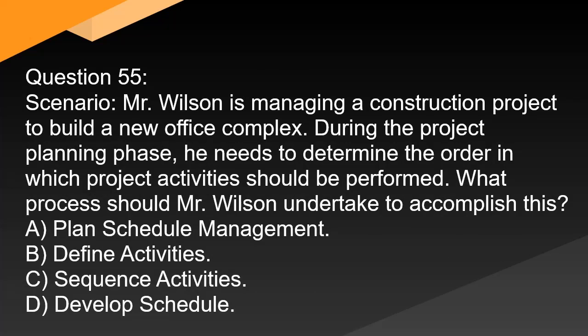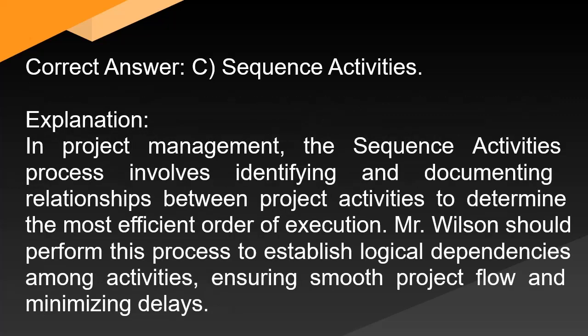Question 55: Mr. Wilson is managing a construction project to build a new office complex. During the project planning phase, he needs to determine the order in which project activities should be performed. What process should Mr. Wilson undertake? A. Plan schedule management. B. Define activities. C. Sequence activities. D. Develop schedule. Correct answer: C. Sequence activities. Explanation: The sequence activities process involves identifying and documenting relationships between project activities to determine the most efficient order of execution. Mr. Wilson should perform this process to establish logical dependencies among activities, ensuring smooth project flow and minimizing delays.